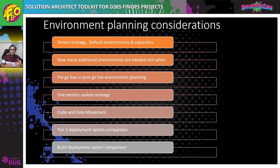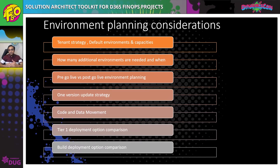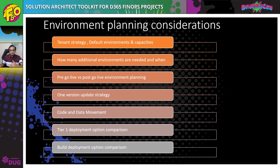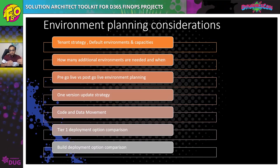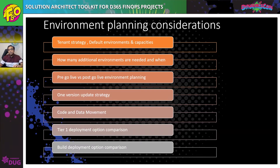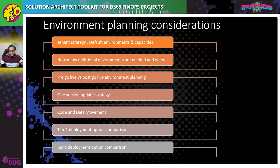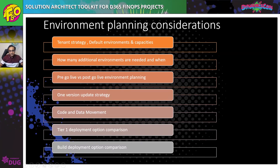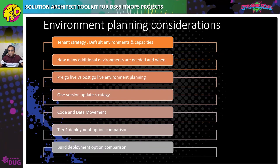Once you understand your default capacity, plan how many additional environments you need further down the line. For example, after your development phase you might need a system integration testing environment and a user acceptance testing environment running in parallel — but you may not need them from the beginning of the project, only towards the end. Also consider your post-go-live environment planning, as you need an environment to service the production environment. Capture how you will move code and data across environments and how packages will be built.